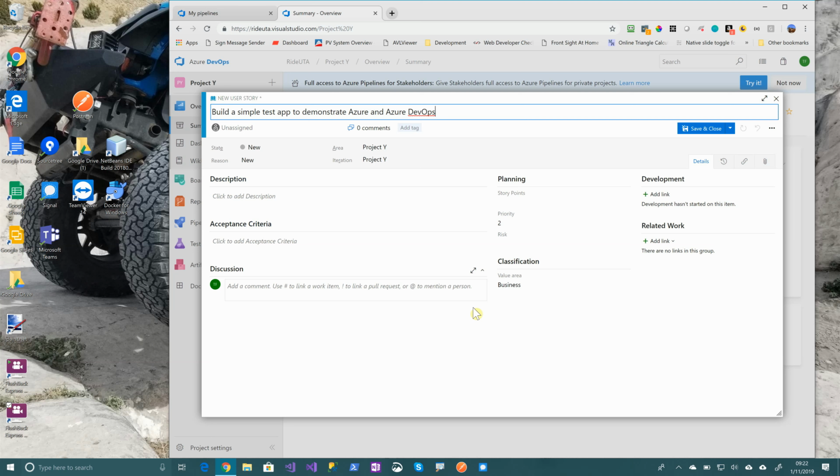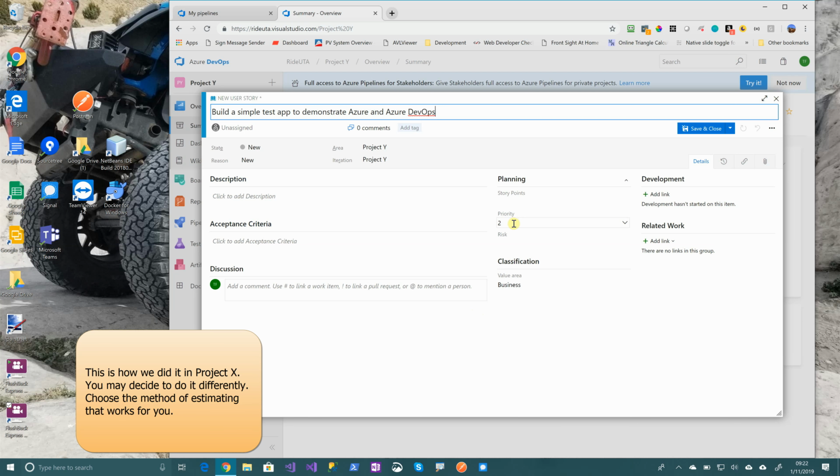How did we use story points for Project X? So, in waterfall development, you would say, okay, this is going to take me 6 hours to do, and you would estimate everything by hours. In Agile development, you don't really do things by hours necessarily. You do things by story points, which are just a way to estimate the development effort that a task is going to take.